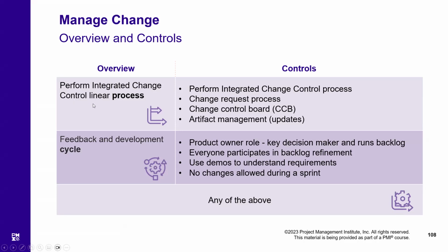All the change requests which are coming in from the stakeholders, from within our team, from the analysis, wherever these change requests are coming from, they all will be accumulated in the integrated change control process, right? And on a periodic basis, the project board will come. They will conduct a meeting, which is called the change control board. Their meeting is conducted on a periodic basis, like every 2 weeks or every month.